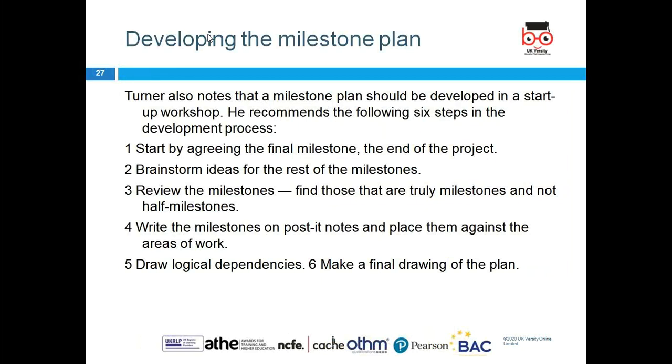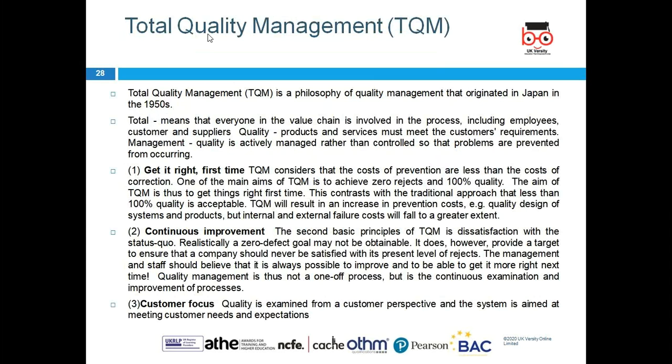Developing milestones is very important. We discussed, according to Turner, start by agreeing the final milestone, brainstorming ideas, review, write the milestones and draw the logical dependencies, which task will depend on another, and make the final drawing of the plan.